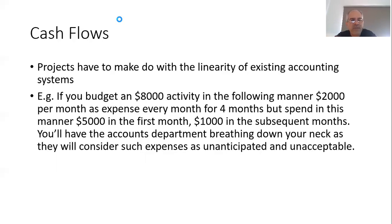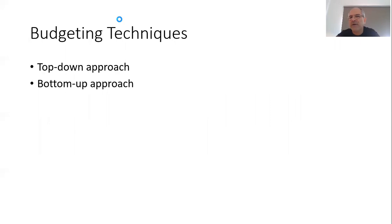Suppose your expenses are $5,000 in the first month and $1,000 in each of the subsequent three months — still $8,000 over four months, but the nature of your cash flow has changed. From a project's perspective this isn't a problem, but you will definitely have the accounting department concerned because they will consider those early expenses unanticipated. You need to understand how you expense out your money once you've defined the budget, and you need a good understanding of your existing accounting process.